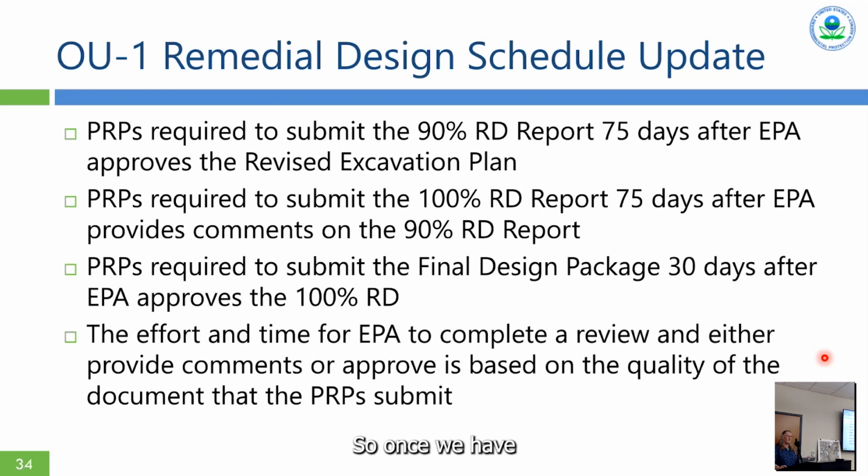And I know this is what everybody wants to know. So once we have that revised excavation plan approved, then the PRPs have 75 days to submit the 90% design to us.